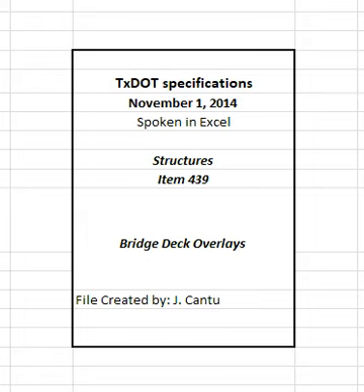6. Measurement. Concrete overlay, latex modified concrete overlay, and multi-layer polymer overlay will be measured by the square yard of surface overlaid using the dimensions shown on the plans. Overlay is a plan's quantity measurement item. The quantity to be paid is the quantity shown in the proposal, unless modified by Article 9.2, Plan's quantity measurement. Additional measurements or calculations will be made if adjustments of quantities are required.